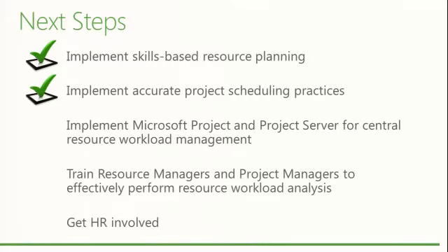The demand part of this is based on assigning generic resources to the tasks and projects. If the work is not represented accurately and properly in those project schedules, then your data is not going to be very useful. So you're going to want to have accurate, or relatively accurate, project scheduling practices in place in order to represent that demand in the system. Project and Project Server, obviously.